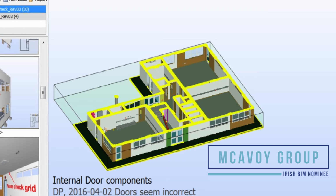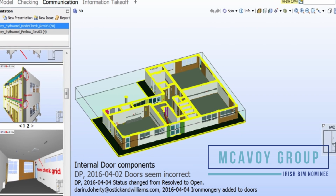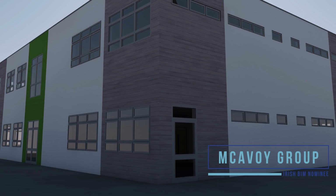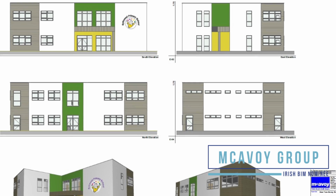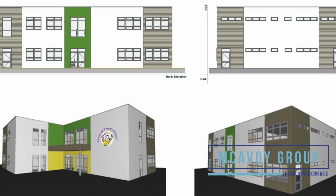That is different to a traditional construction in that when the site elements, the civils, the structure, the foundations are all happening, we are actually manufacturing, constructing the building in our factory simultaneously. What our biggest challenge was on this project, we had to deliver a RIBA Stage 4 detailed design in 4 weeks. And BIM offered us the opportunity to do that.